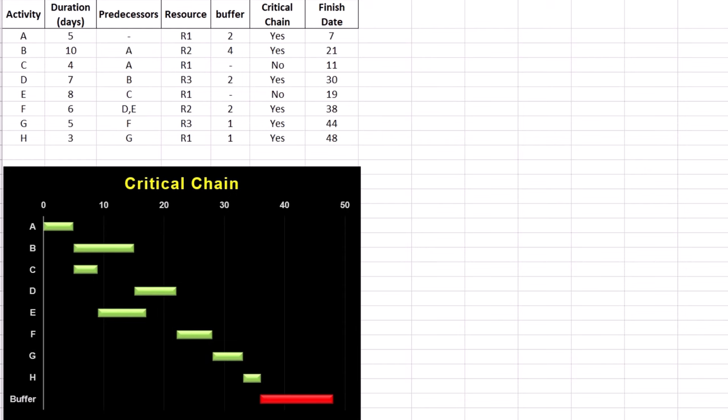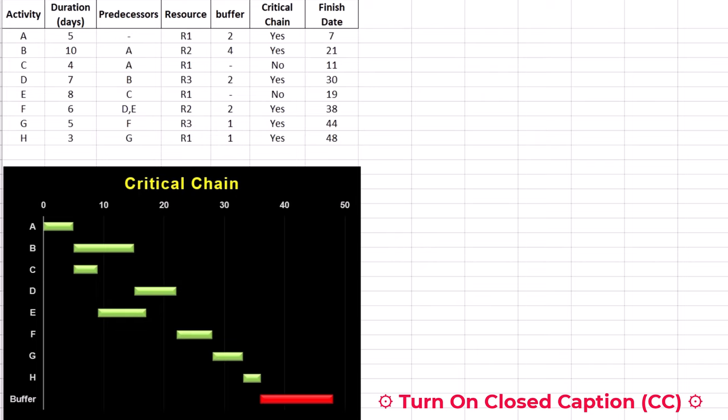Step 2 is tracking buffer consumption and project progress by fever charts. Creating a fever chart in Excel is a proactive tool for risk management to monitor buffer consumption relative to project completion in CCPM. This helps project managers see if a project is on track or not.